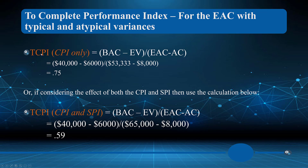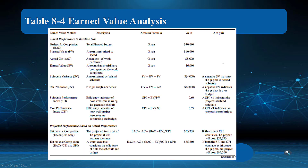For the TCPI based on EAC — both typical and atypical — we use forty thousand minus six thousand over fifty-three thousand minus eight thousand, giving 4.75 for the CPI-only scenario. When we factor in both CPI and SPI, we get totals of 0.75 and 0.59 respectively, meaning the value outcome is even worse. The most realistic result likely falls somewhere between these two estimates if nothing changes.